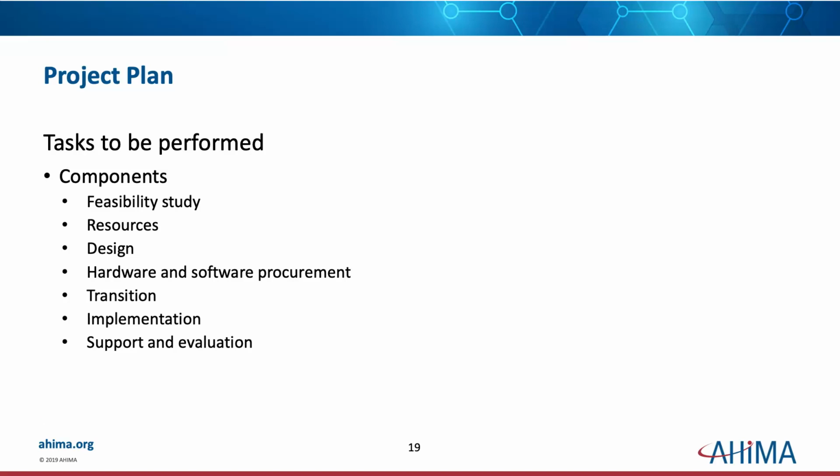There's all sorts of things that you have to take into consideration in that transition and that implementation. And the implementation is not a 1 hour period or even a 1 day period or even a 1 week period. It can be a whole month. It can be the 2 weeks that lead up to it, and the 2 weeks that are immediately after it is your implementation period, where you are doing just an enormous amount to have that transition happen. And then, of course, support and evaluation.